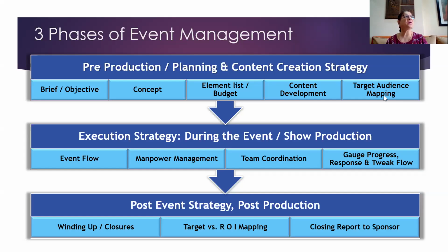Normally this is another 8-10 day phase, sometimes even 15 days when it's a large event, when there are a lot of vendors and sometimes breakage. Bringing down big sets and large production takes about 4 to 5 days also. So depending on everything, that is how the post-production team takes over. It is also the job of the production team to hand over properly to the post-production team in terms of what they need to do.